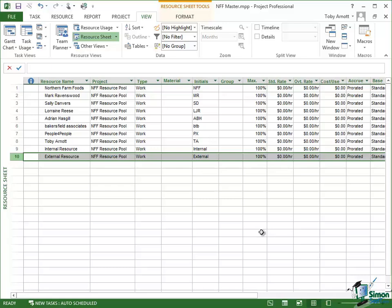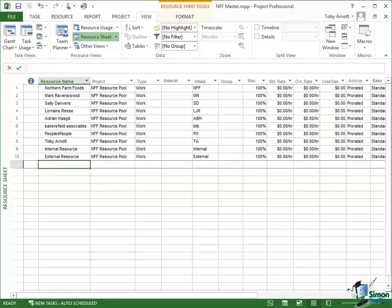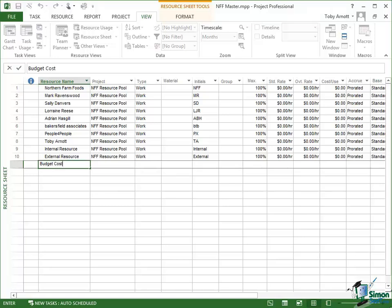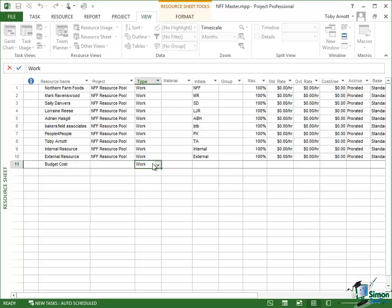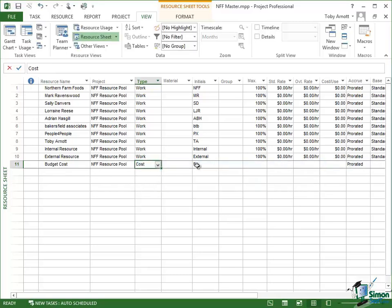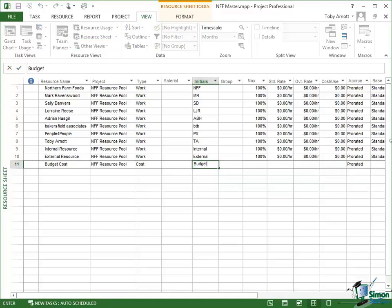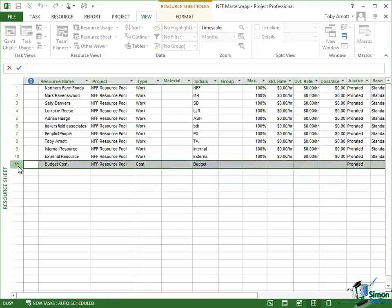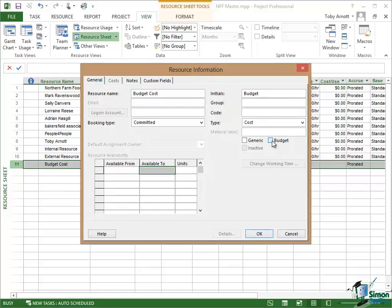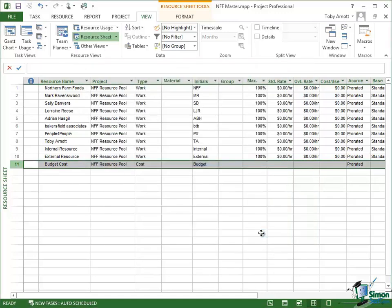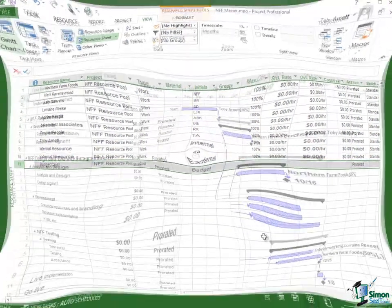Now I'm going to add a third resource. I'm going to call this budget cost. It's really unclear at this stage what I'm including in that, and of course it is unclear. I've come up with a figure there really based on a couple of guesses and a little bit of conservative estimation. Very often budget costs will be based on previous experience with similar projects. But I'm going to say budget cost. I'm going to change the type of that to cost and I'm going to call that just budget, and then I'm going to open that up and make that budget as well. Click on OK. So there are my three budget resources set up.